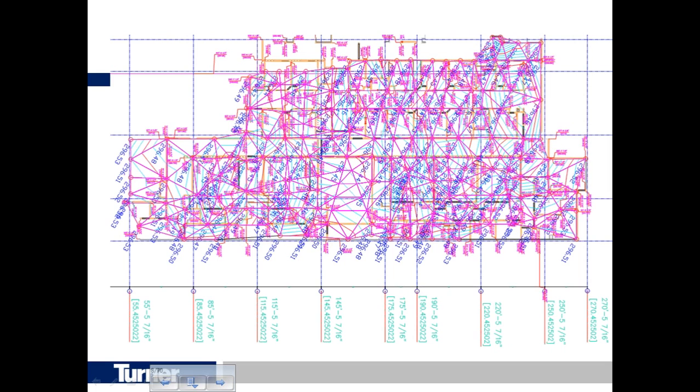What was nice was that we were able to get costing information up front, so it informed us what the cost for elevating slabs was going to be, and we raised the slab elevation in the Revit model to reflect existing conditions.